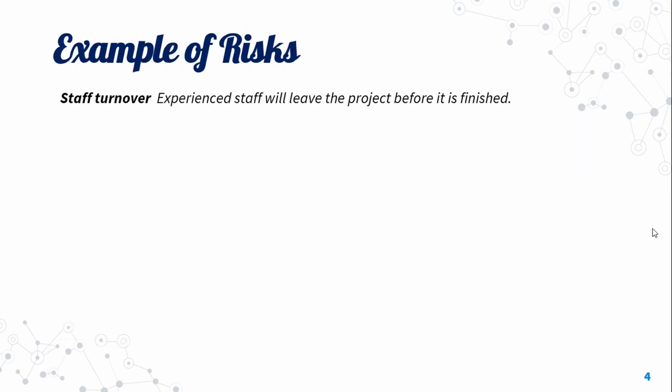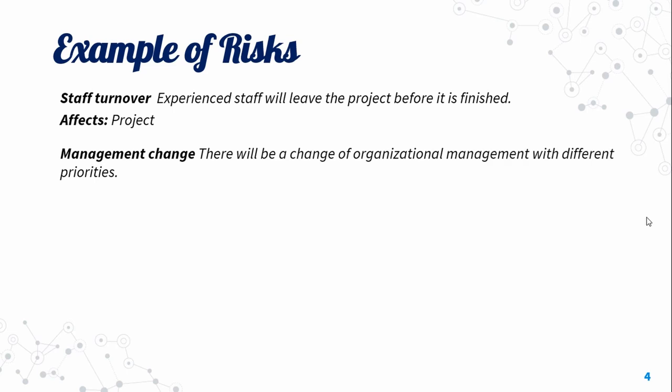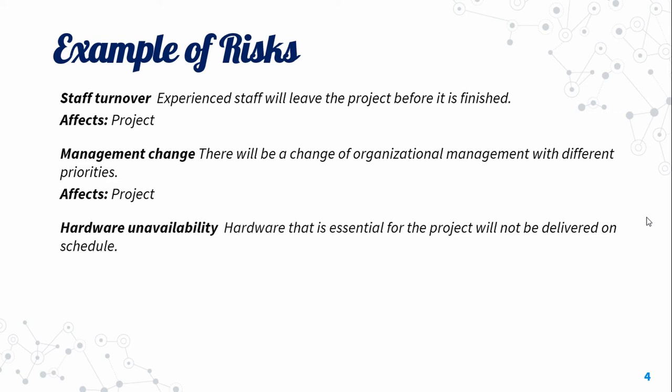Examples of risk: Staff turnover — experienced staff will leave the project before it is finished. Management change — there will be a change of organizational management with different priorities. This is the risk of management. Hardware unavailability is another example of risk.